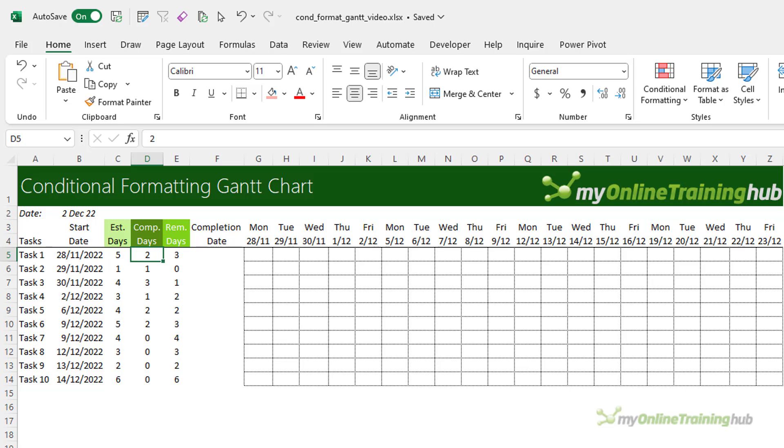or you might review each task and calculate how many days worth of the project you've completed so far. So for the purpose of this example, I've just manually entered the completed values. And then the remaining days is simply the difference between the estimated days and the completed days.